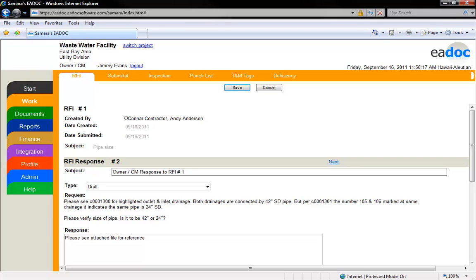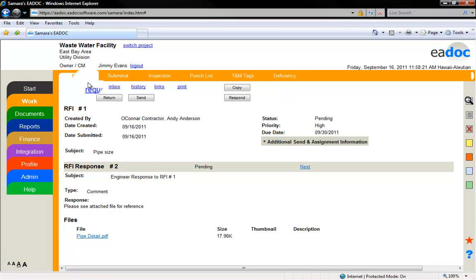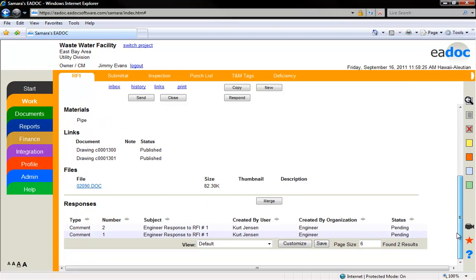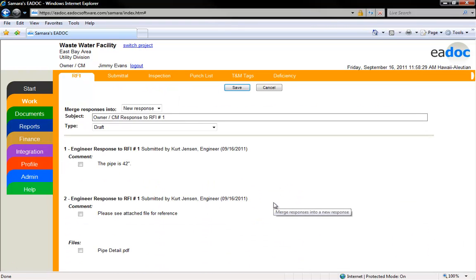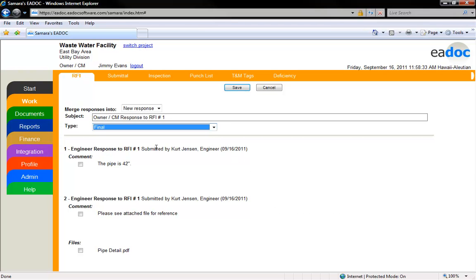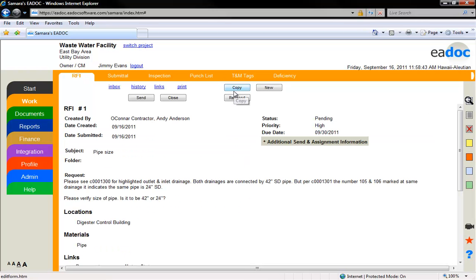You can edit or modify this response. To return to the list of responses and the original RFI document, click the blue Request link. To combine multiple existing responses, click the Merge button. This will take you to a screen where you can select which responses and which attachments you want to incorporate in a new response. Once you click the Save button, a new response will be created which contains all of the selected information.